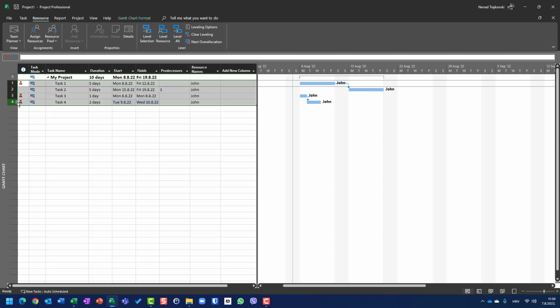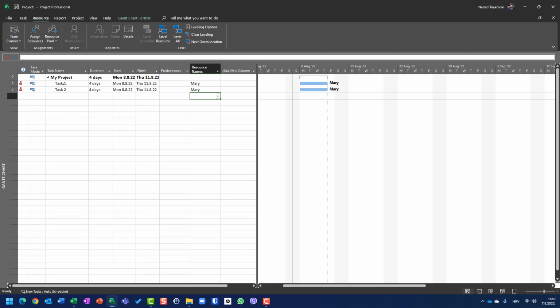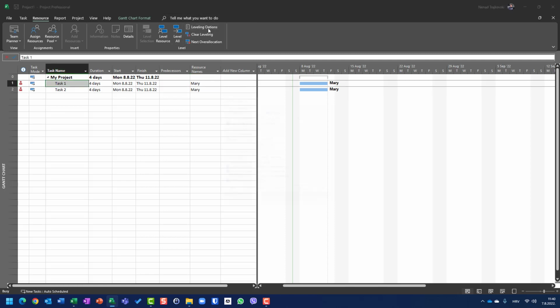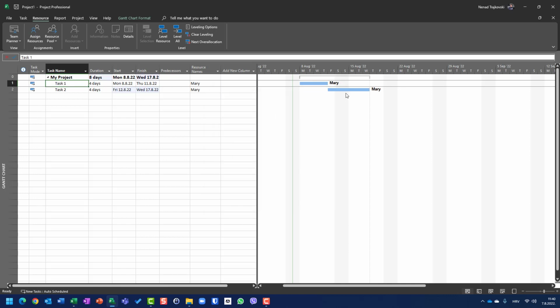Here, I have task 1 and task 2, 4 days. And I will say that Mary is going to work on them. And I go here and I say leveling options, everything is great day by day. I will say level all. You will see that Mary's task is going to be in the future and Mary is not over allocated. What if I want, for example, that task 2 should not be moved? How can I do it?